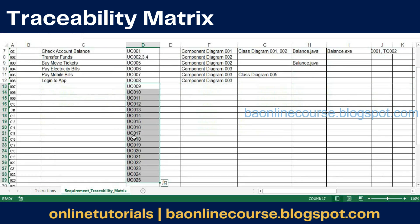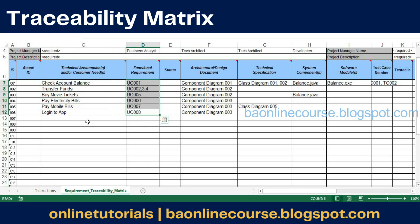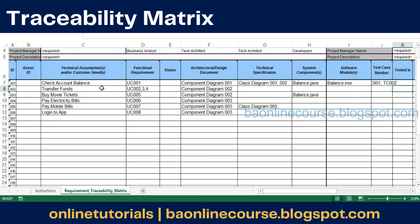This way I'll be sure that all my six features — the six features I agreed to in the SOW — have been covered by these eight use cases. A very simple step. So we need to understand the logic of why we are doing it, then it becomes easy. Don't get confused by complex terms like traceability. Traceability simply means you are tracing your requirements right from your SOW till the point it is delivered into your final system. You map these requirements to the use cases and confirm that you have captured the requirements of all six features, and that eight use cases have come in from them.